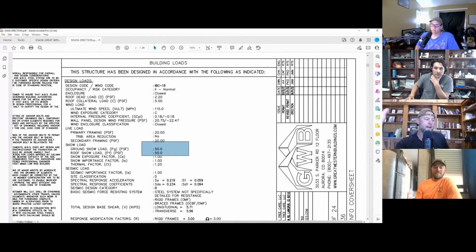Well, how much was that? They told me 26,000, but when we got down to it, the dirt work guy, Matt Fisher, was like, no. We can take it from a 6-inch pipe down to a 4-inch pipe, which will drop the cost by 7,000. And that was just based on occupancy for the building you built? Yeah. And without the dirt work guy, Matt was a genius. That guy is just awesome. He knew the ins and outs of everything, how to save costs here, how to work with the town. Because if we would have had a different dirt work guy and we would have tied in with a 6-inch pipe to the 6-inch sewer line, it would have cost us $26,000. So he's like, no, man, we've done this 100 times.